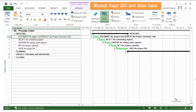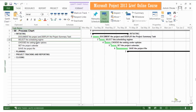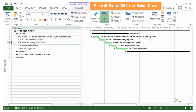As part of initiating, you will learn how to get started with a new project file. Here we are going to learn creating the project summary task that displays the aggregate information for the project. You are going to learn the scheduling regime — that is forward or backward scheduling — where we will learn how Microsoft Project calculates the project finish date if you provide the project start date. Please remember this is the only place we recommend you to enter dates. The task dates are calculated by Microsoft based on your project start or finish date. We are also going to learn how to set up the environment variables for the project file.